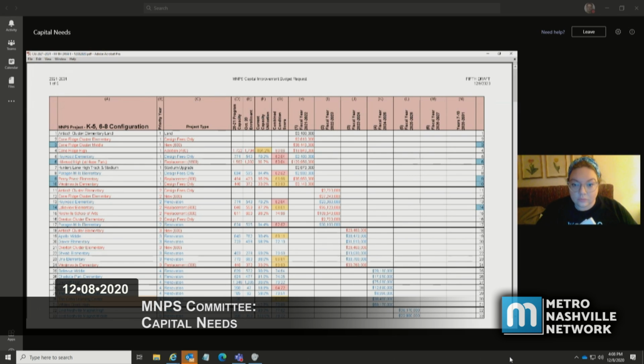I would also like to say this about the cost on Hillwood. Per square foot for a high school, it's commensurate with what we see in the general area that Nashville and our peer cities would be experiencing. And also, it was a cost that has been verified. In fact, we're relying on that cost from the contractor who has been on board to facilitate those pre-construction services, which include estimating. So we are working with them quite closely to make sure that we have the most accurate price, and that is what we have updated. It does include approximately, depending on the trades, anywhere from 4.5% to 6% escalation cost within it from last year.